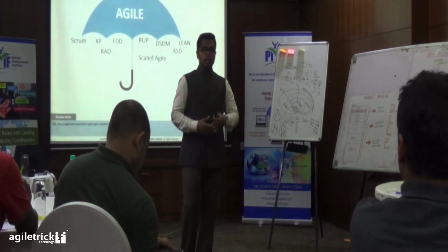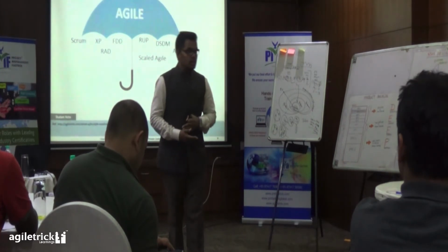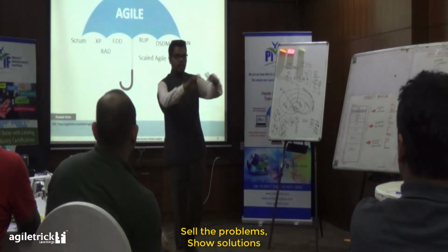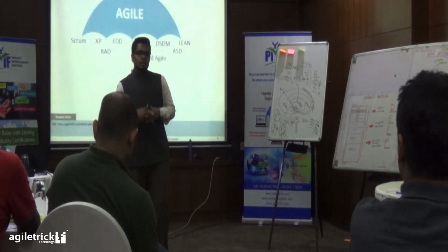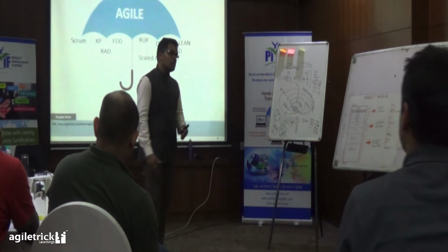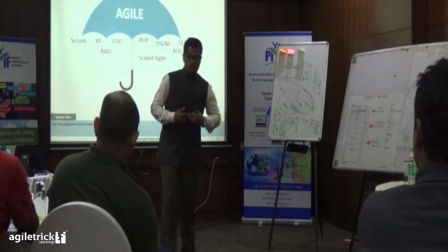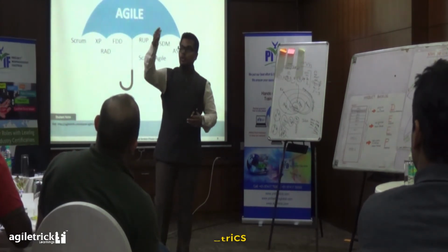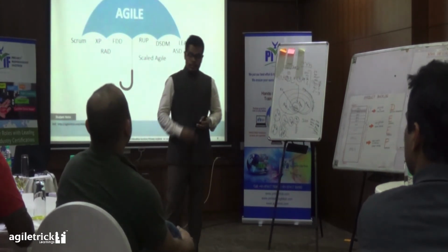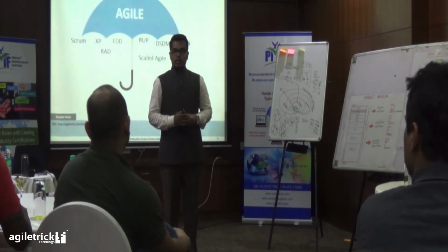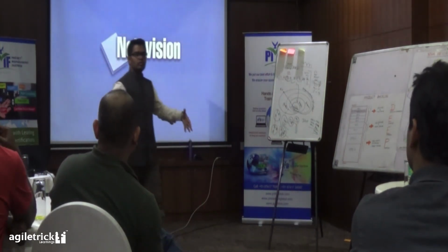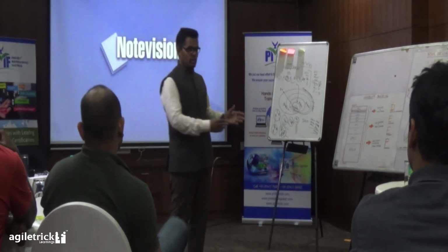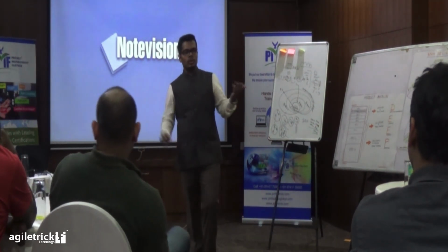You train them, you conduct the trainings, you show them how it works with on-the-job training, then you observe finally. And then the burn-down and burn-up chart. It's not always you who updates it; it's the team's responsibility to update the burn-down and burn-up chart. But as a facilitator, you should know the burn-down and burn-up chart in and out. You should see what's missing, why the graph is going flat. Every team member has that responsibility to update it. Tracking: burn-down is how much is remaining to do. Burn-up is how much you have completed. Both sides of the coin; whichever one you want to use, you go with it.